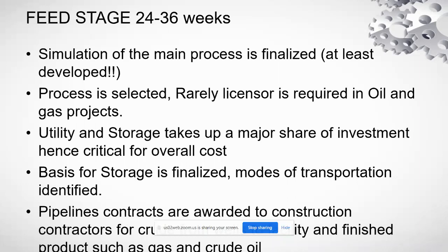During the feed stage, or probably near the end of it, pipeline contracts are awarded to construction contractors. The aim is to finish the pipelines near or around when the mechanical completion of the main facility is expected. Pipeline projects probably involve hundreds or thousands of kilometers of piping.